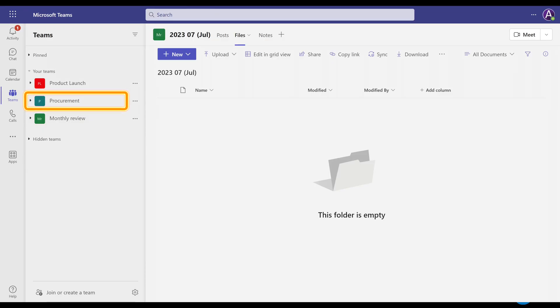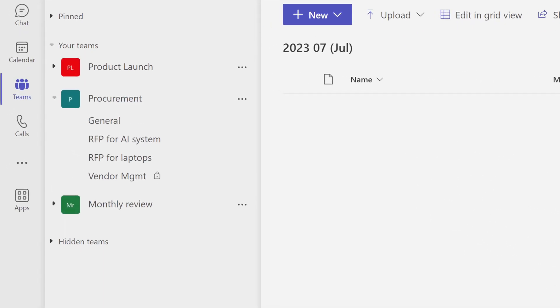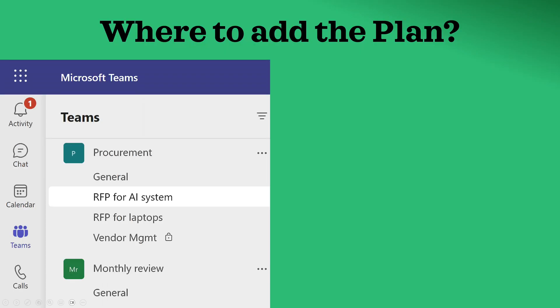Before we go ahead and see how to manage tasks, let me tell you where to add it in Teams with two examples. One is a team called Procurement, another is a team called Monthly Review. In the Procurement team, for every RFP I have a different channel because laptops are procured differently and AI systems are procured differently. The tasks for each one of them are going to be completely separate, so I'm going to add a separate plan for AI and a separate plan for procurement.